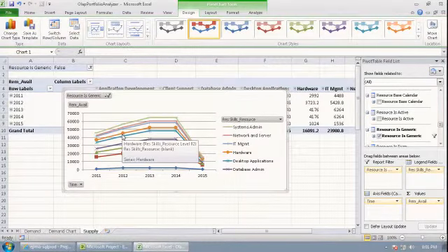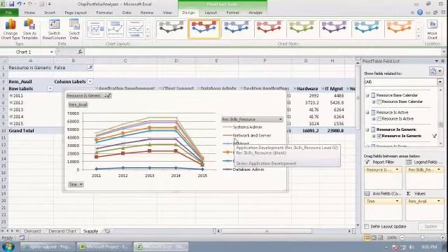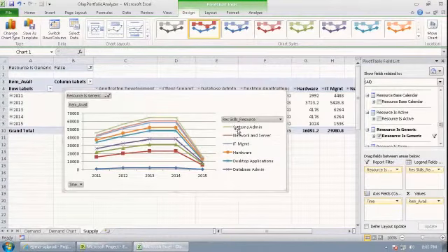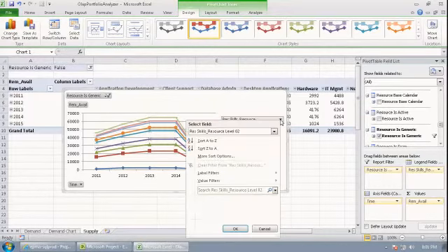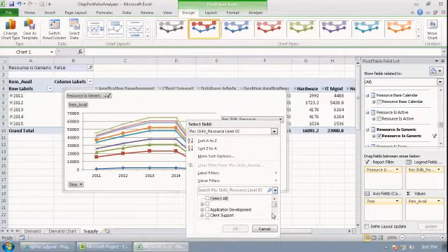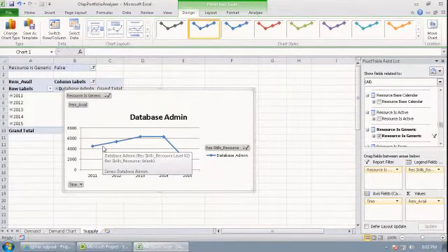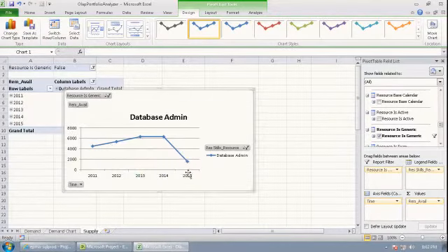Now, of course, this isn't a simple little chart with a demand and supply with two lines on it, that are crisscrossing their way across the timeline. And that's just because we're representing multiple roles here, or multiple skills, I should say. But if you're interested in looking at one particular type of skill, it's actually very easy to filter these and say, you know what, I don't want to see all of them. I only want to see database admin skills. Okay, so there's the demand, the supply of folks who have database administration skills over time.